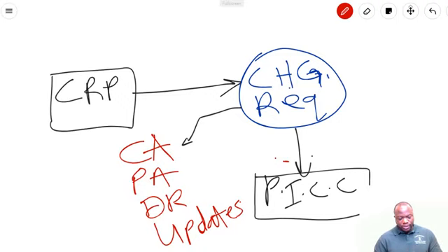Also, something else I'd like to call your attention to is at the very beginning of the dialogue on page 115. So this is very important. Midway in that paragraph it says, every documented change request needs to be either approved, deferred, or rejected by a responsible individual, usually the project sponsor or project manager.